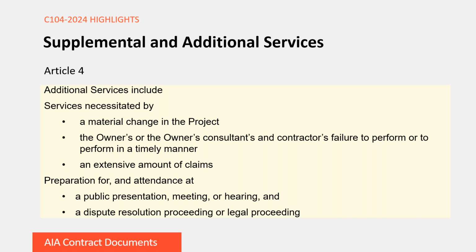You may also see that there may be a need for preparing for and attending a public presentation, a meeting, a hearing, or even a dispute resolution proceeding or legal proceeding. I should also note that if there are additional services related to preparation for or attendance at any one of the dispute resolution proceedings or legal proceedings, it's not necessarily going to be an additional service if the owner's representative is a party to it.